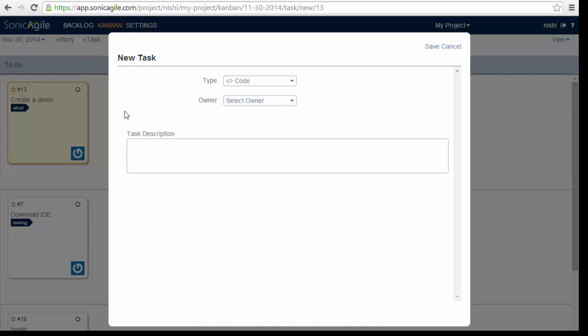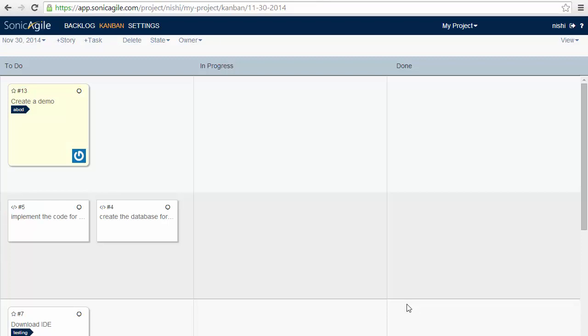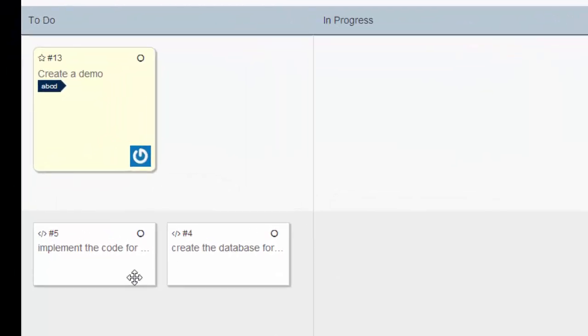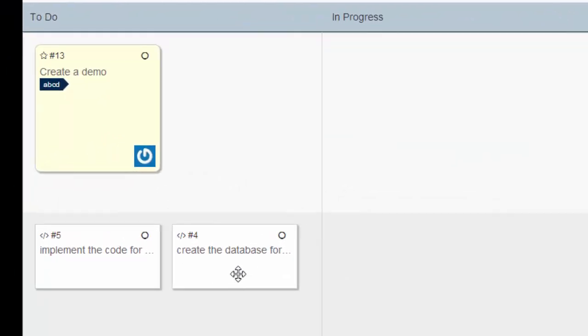Now the question is why do we need tasks? I'll explain it with an example. Imagine that the story created demo has remained in to-do column in our Kanban for several weeks. In that case, you might want to break the created demo story into several distinct tasks such as create the database or implement the code for the demo and so on. That way you can better track progress completing the overall story by tracking when each task associated with the story is complete.